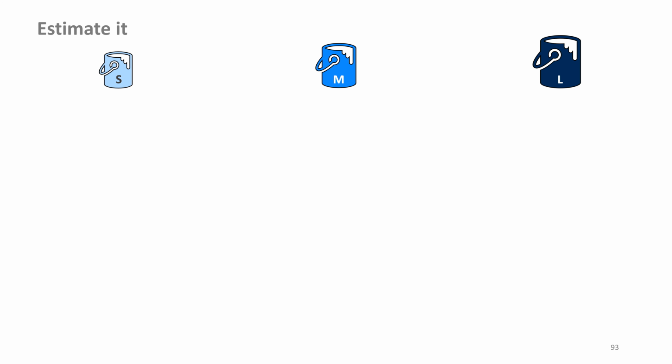Imagine we have a backlog with different user stories in it. We have a rough estimate of how much work they mean. Now we could sort them into 3 different sized buckets. In one, where everything small goes in, a middle one, and a very large one.